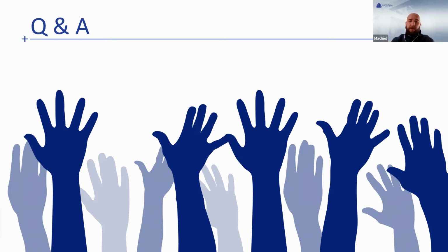So what's great about any kind of system is the standardized way of doing things. The moment you do, let's say, RFIs via email, the emails get sent around a lot of times to different people, and it takes a lot longer to respond. When you implement a standardized way, you've now got specific roles throughout your RFI, and the information will flow from one person to the next, making sure it gets addressed in the correct order of assignment, with trackability and ultimately also communication around it.